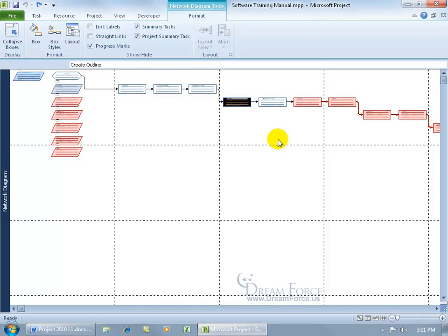As you recall in the previous training video, we learned about critical paths. There are a series of tasks that must finish on time so the project can finish on time. And it's marked in red each task that's critical, that if you delay one, it knocks the next one out, and that one's critical, so it's going to knock the next one out. It's like a domino effect until it pushes out the project's finish date, in which case we're no longer finishing on time.